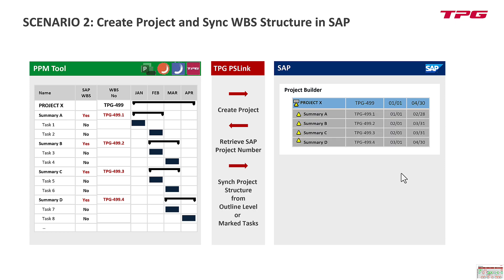We bring the SAP project number back into Planisware and calculate the WBS numbers. Then we upload the WBS elements on the SAP side. Now we have structure identity between the project schedule on the left-hand side and SAP PS on the right-hand side. Of course, the whole story could have started on the SAP side and transferred to the PPM tool, and then we add levels below, like tasks.